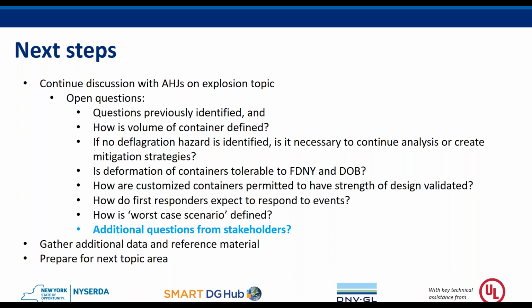And it has been discussed. Yeah, sure. I'm not sure when the question was sent in, so maybe it was addressed already in the portion of the presentation where I talked about it. But the long and the short is that no, there haven't been any labs accredited. UL, because they designed the testing methodology, is right now, of course, the most experienced in executing it. It has been proposed that labs that are otherwise accredited by DOB for other tests, or nationally recognized testing laboratories, might be on the short list. But right now DOB is working on developing a set of criteria, because labs can't be accredited for this methodology right now because it's not a formalized standard yet. I hope that helps address the question.